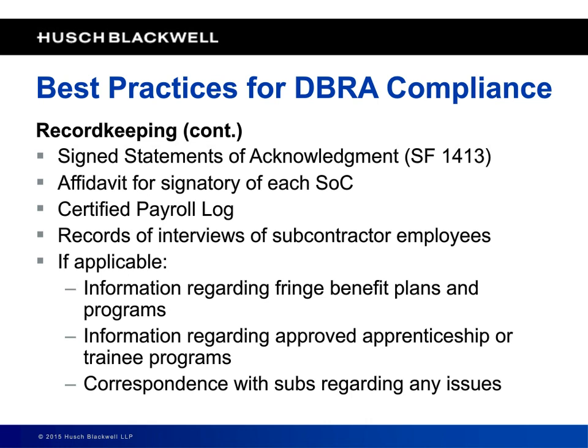And then, if applicable, if you're running into problems with subs, make sure that you keep all the correspondence that you had with the subs regarding their noncompliance. You've got to revise certified payroll from them, that you sent them a notice that their daily record and their certified payroll and statement of compliances didn't match up.